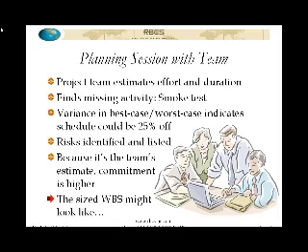Okay, so let's say in our hypothetical case study here, we go through, we estimate effort and duration, find a missing activity, smoke testing, and look at variation, best case and worst case. Okay, it could be a 25% swing either way. The best case is 25% less, and worst case is 25% more. We identified the risks and listed them. Those would then get pushed into the test planning process, right?